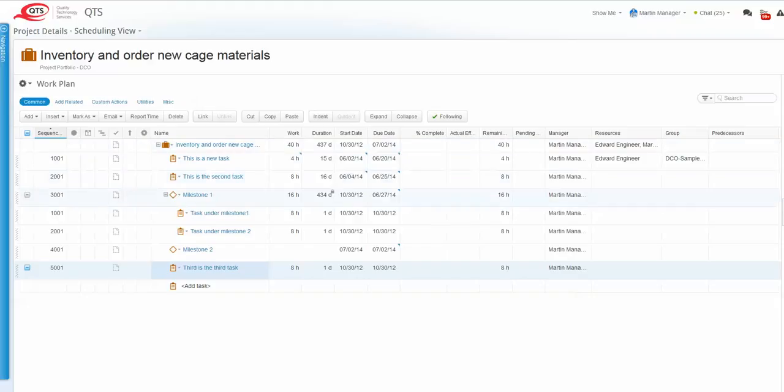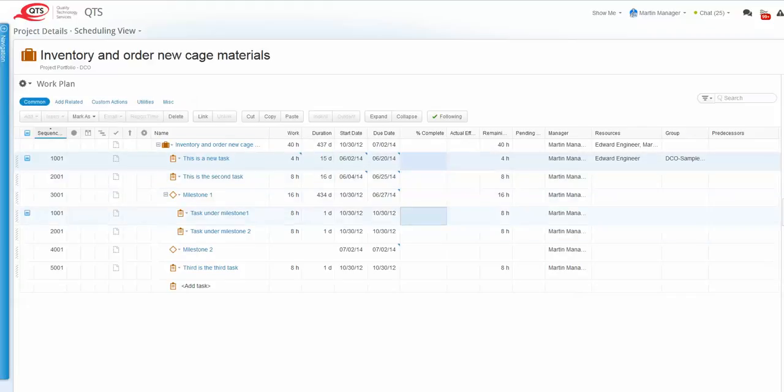And to link two tasks, to set one as a successor and one as the predecessor, you want to highlight, click on the first one and click on the second one. They don't have to be in any particular order. They don't have to be under the same milestone. They could be like these two tasks. I want to relate them to one another. Here I've got these two tasks highlighted, and you're going to click link.